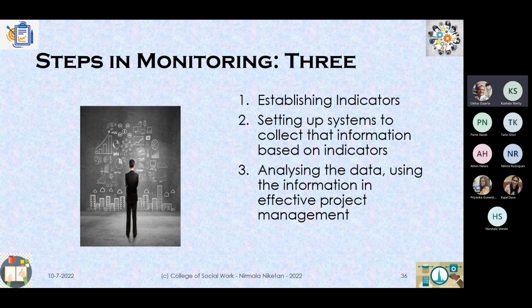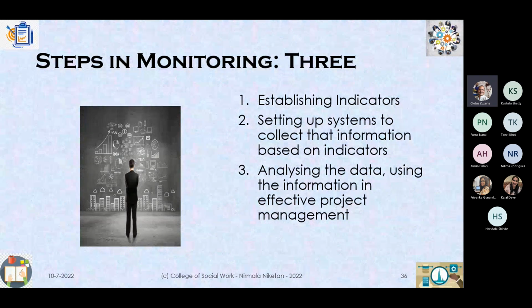You need to look at your staff primarily collecting data. They would need to prepare reports, they would need to develop an MIS system that tracks the number of meetings and the women's savings per month, right? Am I on track with what I'm talking about? You need a system that looks at SHGs in terms of how much the women have saved and how much they have been able to inter-loan within the group. What issues were discussed during the meeting? How have those loans been connected to those issues? Who are the women who took decisions at those meetings? Because all this would be recorded in the minutes book, right?